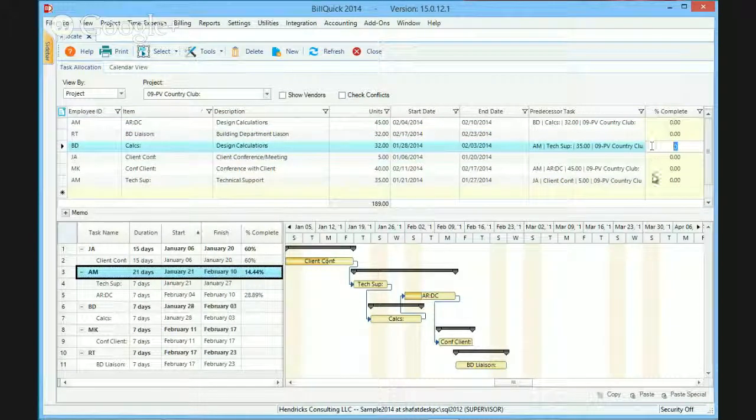So you can see what the person is reporting as percent complete versus what the actual percent complete is. As an example, if you gave somebody 10 hours and he's already burned 4 hours on it on his timesheet, the actual would be 40%. But the employee could say, hey, I'm 20% done, I'm not 40% done. So you can see those deltas between the employees and all that.